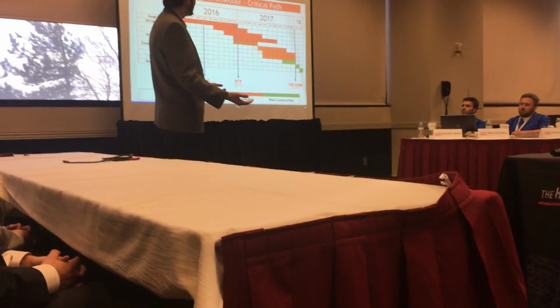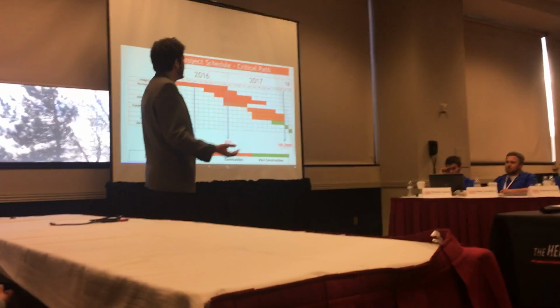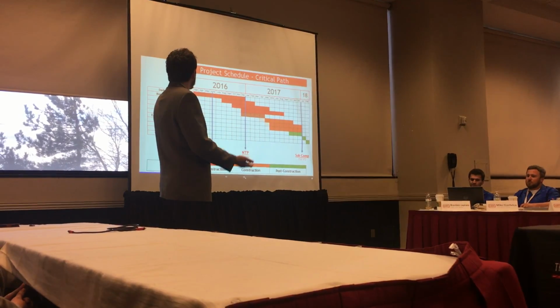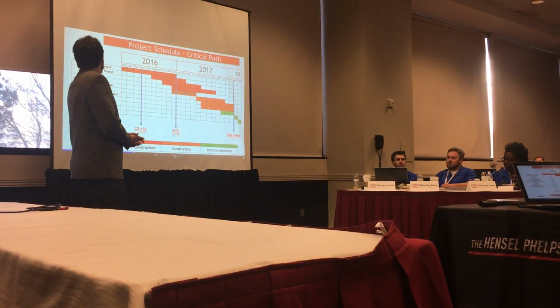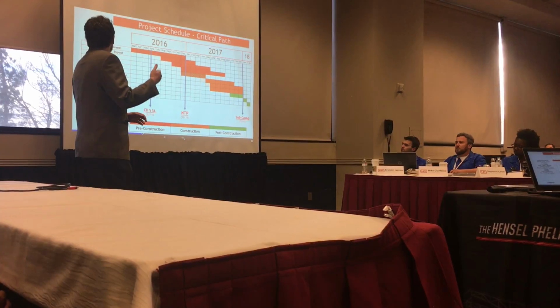Once we buy out our subcontractors, we get submittals from those subcontractors, and finally we get procurement of the materials onto the site. Once we get our NTP for the beginning of the construction, we go on to begin with the structural upgrades for the site.